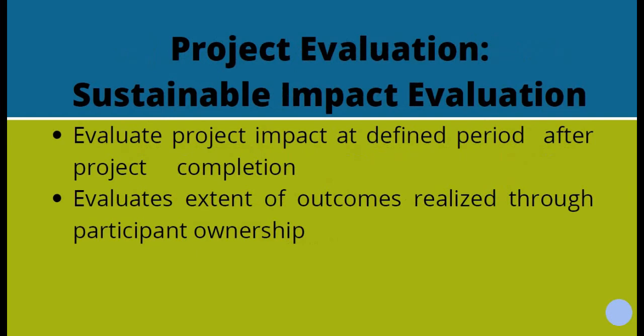The sustainable impact evaluation happens after a time period following the end of the project — perhaps a year after the end of the project. This is to determine whether the sustainability that we expected was real. This process takes place sometime after the end of project transition, perhaps six months to a year after. The purpose is to determine whether the outcomes expected after the transition have been realized, and the extent to which the project has continued under the ownership of the community.